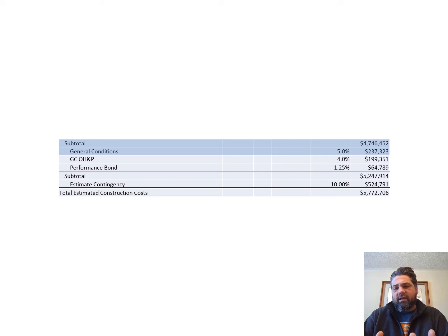There are all these things that have to take place that actually are part of the construction process, but aren't part of the building. And so those are what are considered the general conditions. Renting of maybe some equipment, general cleaning during construction, those sorts of things.